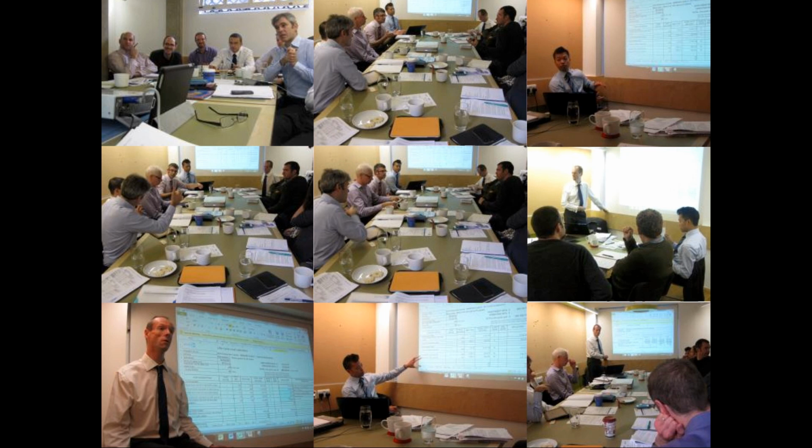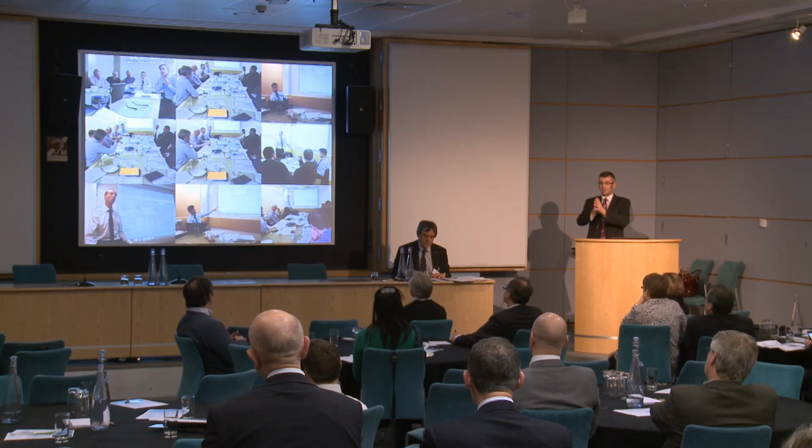There was incredibly good take-up from the client. We got the right people in the room. We were able to ask questions. We were able to really reality check what goes on. And the best thing was, these guys were telling us exactly what happens at the university. When we started talking about windows, we said, right, timber windows, aluminium windows. So now we're playing the cost idea, we're now playing the carbon idea. We like the idea of timber windows because low carbon, so we're thinking that's a way to explore. But our friends in the estates department said, I'm not going to maintain them.